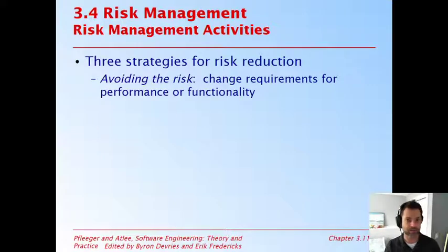Let's make it semi-autonomous, where the user always has to have their hands on the wheel, so if they see they're going to hit the wall, they can correct. Then the other risk is people not paying attention and just assuming it's working, so that's your Tesla autopilot problem. But this is one thing you can do: you can change your system so that this risk is elsewhere, or it's not a problem for your system.